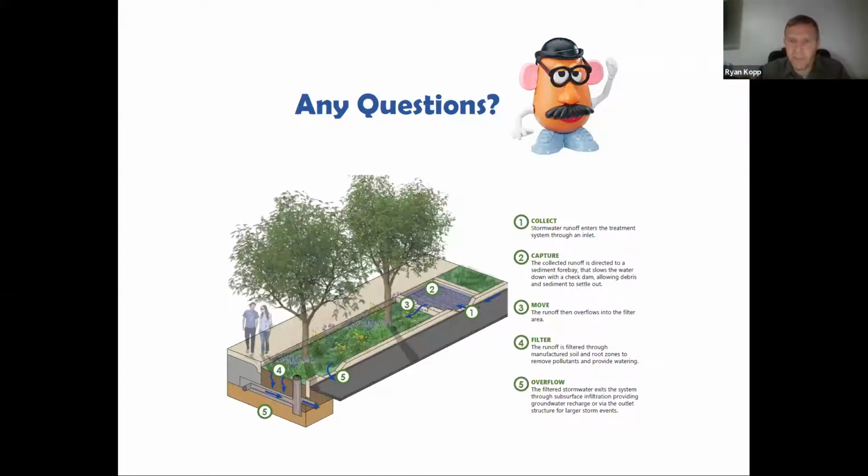Okay, here's another question about costs. They understand that there's some variability in costs, but is there sort of an average cost for implementing a BMP like this? Yeah, that's a really good question. Brian may have some information as well. I can say from our experience, the average cost, typically what we would use based upon square footage or treatment volume, is usually somewhere, I want to say, in the $7,500 to $9,000 range.